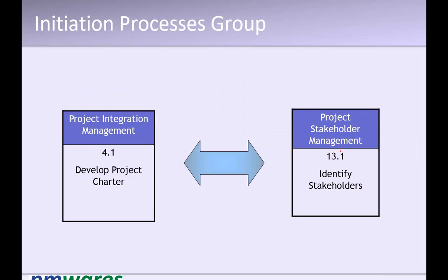So if we look into the initiating process, there are only two processes in initiating. First, we develop a charter which guides the total project. And second, once we develop the project charter, we identify stakeholders, that is, who the stakeholders for the project are, so that we can appropriately plan their engagement.